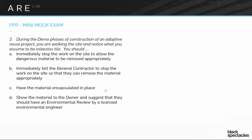Question number two: during the demo phase of construction of an adaptive reuse project, you are walking the site and notice what you assume to be asbestos tile. Adaptive reuse is when an existing building had one use and is now becoming something else, like an old loft building becoming residential lofts. These projects have a different schedule because there's often stuff you don't know about the building until you start demo, so new environmental issues like this can arise.